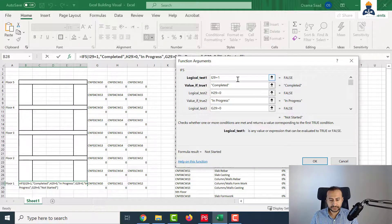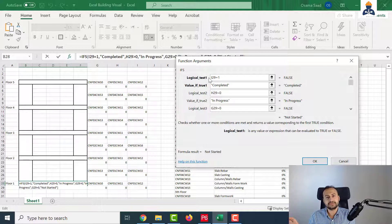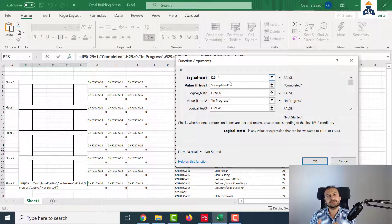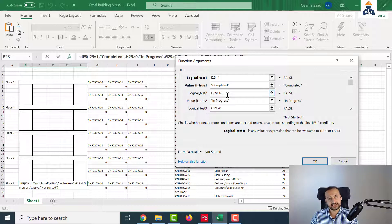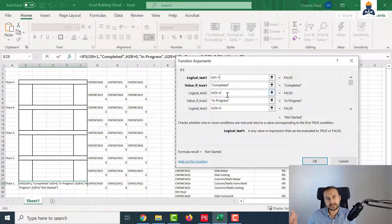In the IFS formula, the outcome is determined based on priority. If the first test condition is met, show me the value of the first test. But if it's not met - if the condition this-equals-1 is wrong - go to the second test and run it. If it is wrong also, go to the third test. This is how the IFS formula works based on priority. That's why I wanted to start with casting, because if it equals 1, it is completed and you do not have to run more tests. If the first condition is not met, it will run the second test - if it's greater than zero, there is progress going on, it is in progress, but the casting is not completed.